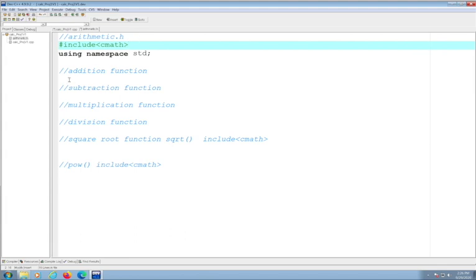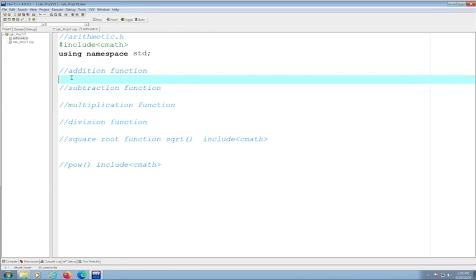Fantastic. Now, let's think about what other things we want to do. During sprints, typically you're going to have meetings where you decide with other developers what you're going to do, how you're going to do it, and when you're going to do it. Then you group your work in tasks: a backlog of things you want to do, versus things you're actually doing, versus things you've done. But to go from doing to done, you have a lot of things going on.